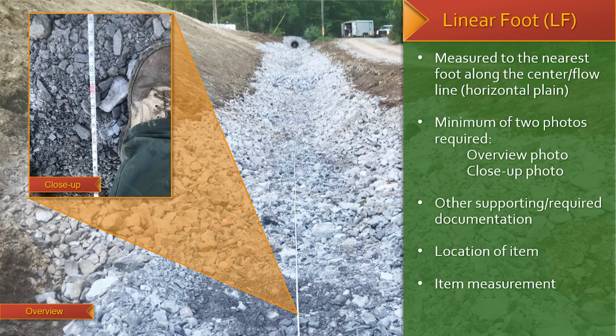Linear footage items are typically paid for actual feet measured to the nearest foot on a linear plane.